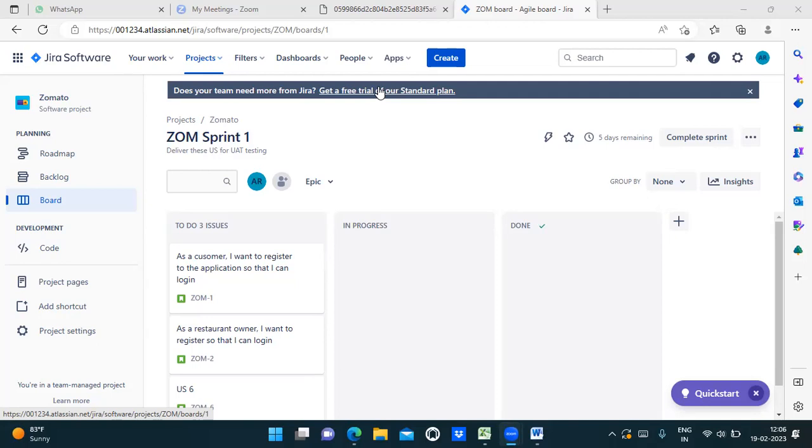Back-end work is happening. In Jira you're only managing the project, but out of Jira, you're handling the change request process, you're handling the meetings, you're taking everything. But as per the Agile rule, you cannot add a change request directly to the sprint. You will add it to the product backlog. Then you'll add it to a new sprint, but not to the sprint directly. That is what I'm trying to explain here.